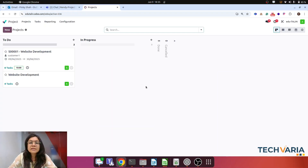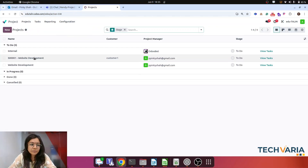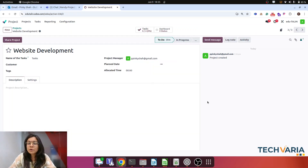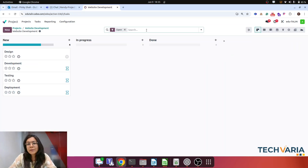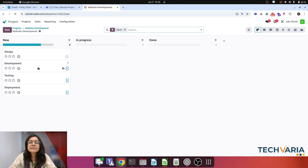Step number one: I am going to use the concept of a project template that I will link with the product. First I am going to open the project template called 'Website Development.' This template has four predefined tasks: design, development, testing, and deployment. These tasks are dependent on each other — once design is done, development will start.